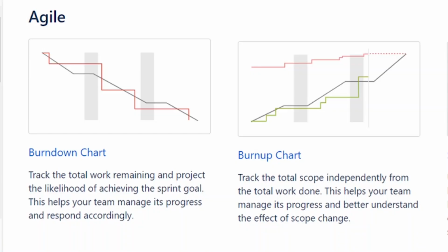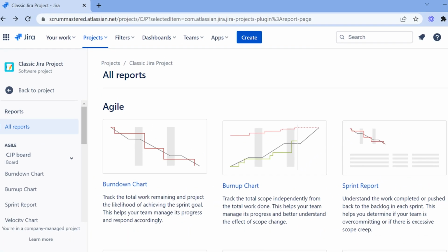You will notice that I don't go into details on the burndown chart that you will see at the very top of the Sprint Report in Jira. The reason is that while it can be useful, I find that most teams do not go to the level of detail that this chart actually needs. Most of the time, teams work on the level of the tickets, user stories in Jira that take several days to complete. But burndown chart is most useful when you break down your tickets to tasks that take about 1 day work. And if you don't do that, I find it much less useful.